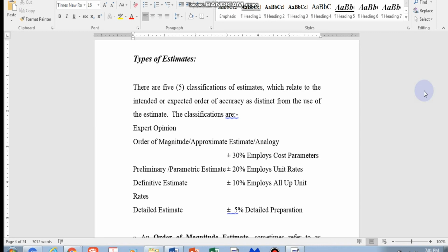For detailed estimates, it is actually the most important thing ever for an engineering project, whether it's done by the contractor or the consultant. But you need to know the workflow, the work sequence, the parallel activities, the sequential activities. All this needs to be very clear before you can actually do that. So basically, the schedule needs to be ready.